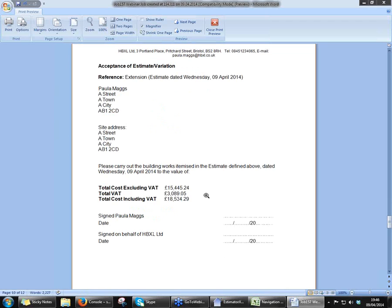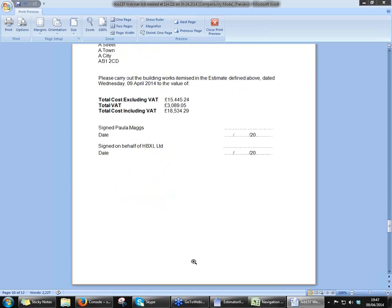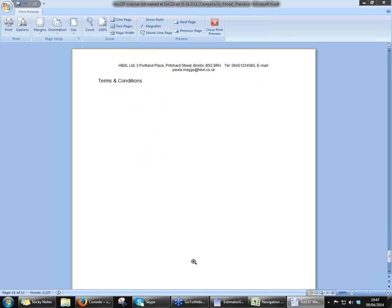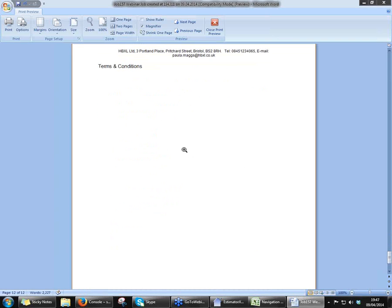We also give you two of these letters out of the box, guys — there's one for you and there's one for the client. At the end of the day, get them to sign and date it. Again, put that little line of text in about variants needing to be signed off before you do the work. The very last part of the software is the T's and C's. It would be pretty cheeky of us to predetermine the T's and C's and put them in there for you. Within your Preferences, though, that I showed you a moment ago, you can actually set up your T's and C's so that every time you produce a quote, this blank page will automatically be populated with your terms and conditions. So that, guys, in a nutshell, is Estimator Express.